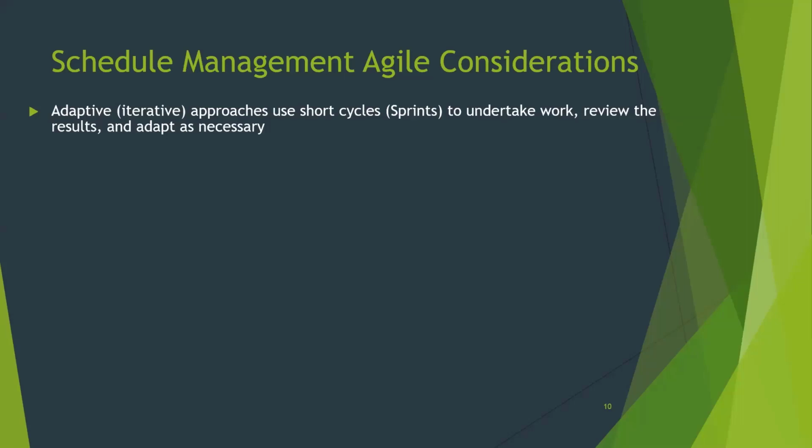So let's say you have 100 requirements that need to get delivered that are part of your requirements backlog. And you've decided you're going to use 3-week sprint cycles. And let's say the team has decided on average, you can deliver 8 requirements in each 3-week sprint cycle.